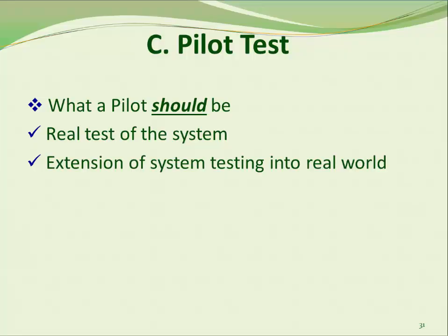Pilot testing may prevent costly mistakes and can begin after UAT results are approved by FNS. Pilot testing occurs when a fully functional prototype system, all operating components, is available for testing in a live production environment, but before statewide implementation. Pilot is the best opportunity to identify defects in either the system or the implementation approach before they become costly large-scale problems. This is because you can modify errors, bugs, and glitches before the system rolls out to all users.